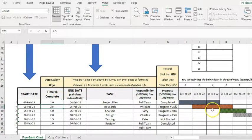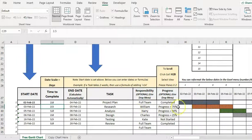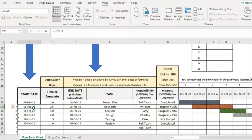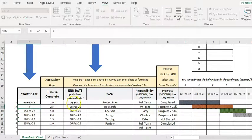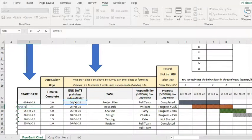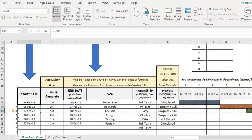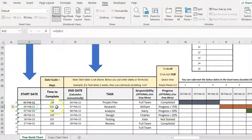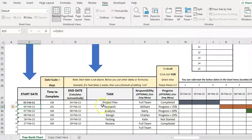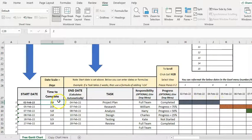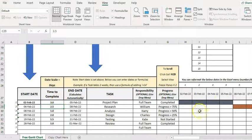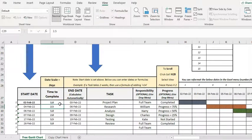If I want this second one interactive, what I do is I do a formula to say this starts one day after. So you can see if I change this time frame, that should change and the next one will change as well. So let's make that three and you can see that gets pushed out. If we think we can do that a lot faster, it comes forward.